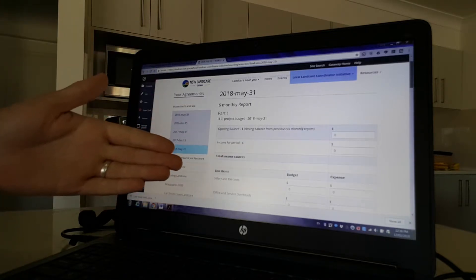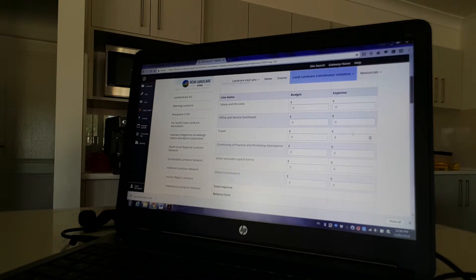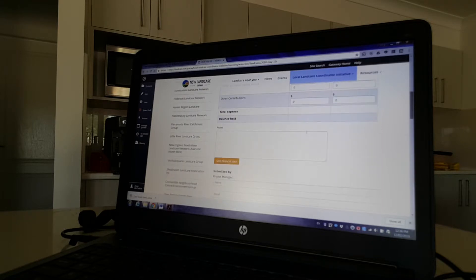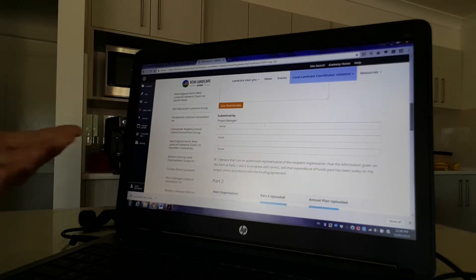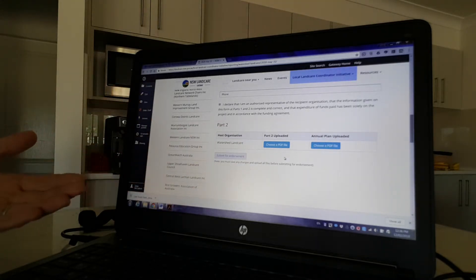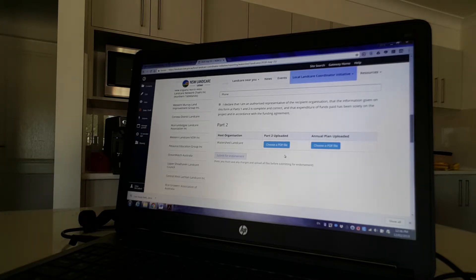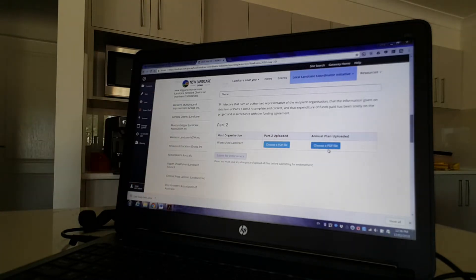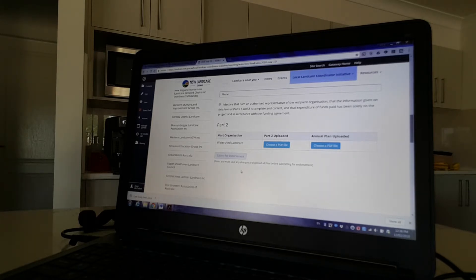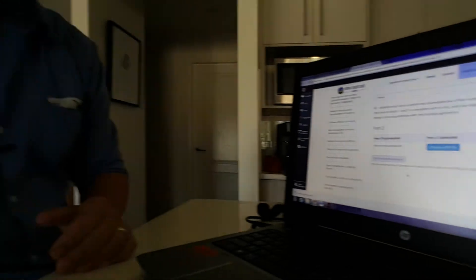Straight into it — budget details go straight in here, so this should look familiar to anyone that's already used it. This is an update on how the program budget is going and how you're tracking against that. You then save it and endorse it if you're the project manager. Next, uploading part two — which covers making sure your contacts are together, the community of practice activities you're engaging with, and then a reviewed version of your annual plan, which we ask for every six months. You upload a PDF file, then submit for endorsement, and that should be six-monthly reporting done for you as LLCIs.